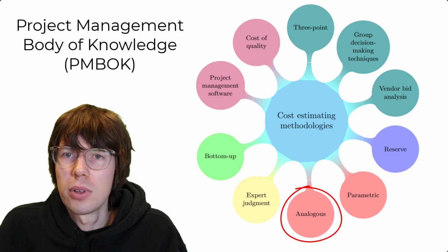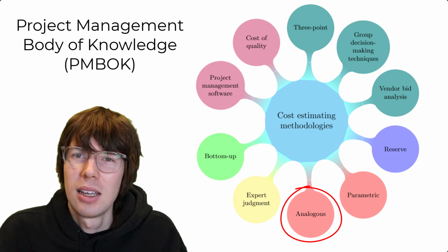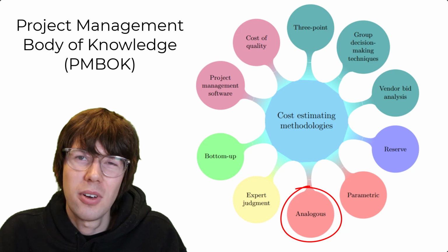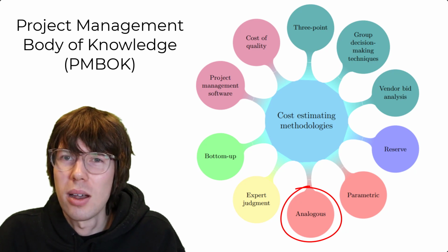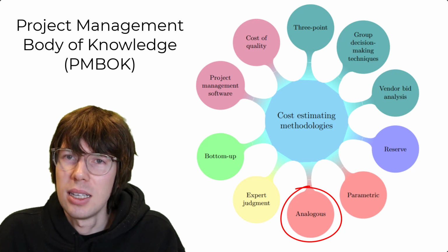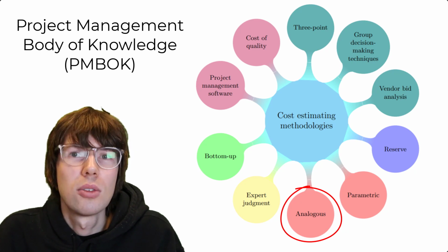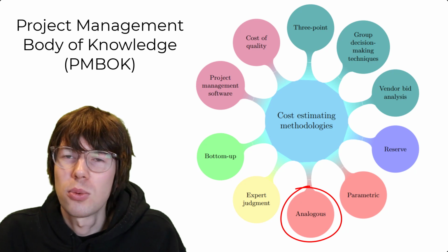We have something called analogous cost estimation. The defining characteristic there is that you estimate the cost of a project based on only one single previous data point. So if you know the cost of a previous project and you know the value of its cost driver, and then you know the value of the cost driver of a new project, you can scale the old project.